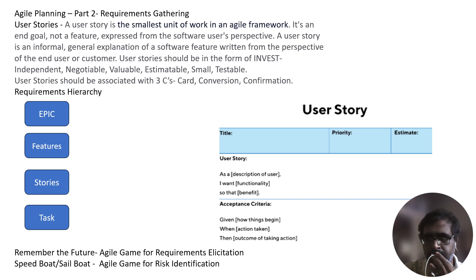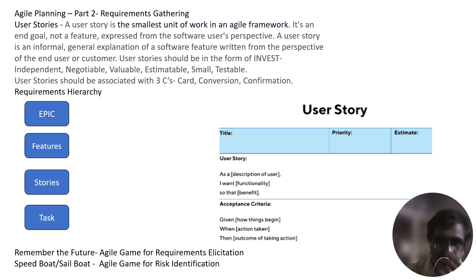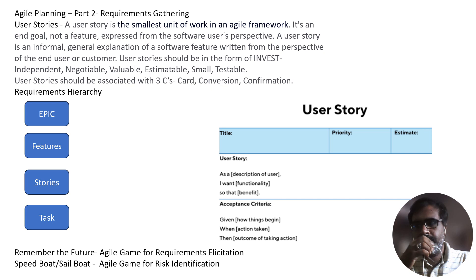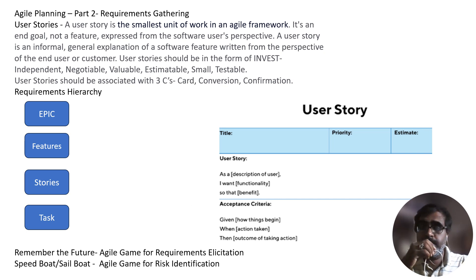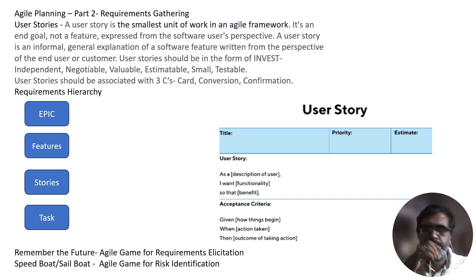This is an example of a performance requirement of the system. A user story should always cover all the layers of the system architecture and not just one or a few layers. For example, a user story like 'As a user, I want my name stored in the database so that I can retrieve it later on' is not a good user story as it mainly covers the database layer. A better user story would be: 'As a user, I want to enter my name in the system so that it will be available whenever I login to the system.' This is the way user stories should be structured and approached.